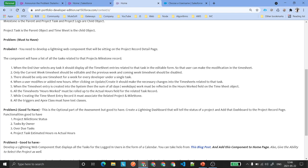When a user modifies or adds new hours and clicks Update or Create, it should make the necessary changes to the timesheet related to the task. The hours you add should roll up to the task, showing the total number of actual hours that developer has worked on that task.